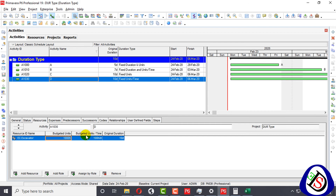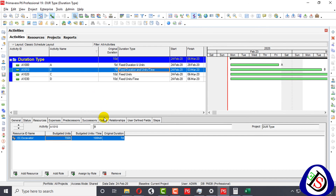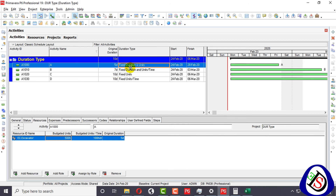To summarize: in Fixed Units, budgeted units are constant; in Fixed Duration and Units Per Time, fixed duration and budgeted units per time are constant; in Fixed Duration and Units, duration and budgeted units are constant; and the remaining variable in each case is what gets recalculated. This is my brief content on duration types, demonstrated by assigning resources.